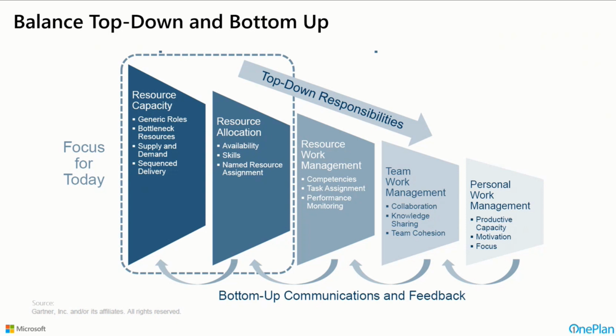Now, the bottom up might be, all right, now we've got detailed project schedules or work plans, and we're assigning people to specific tasks or work elements, and that information is all rolling up on a time phase basis to give us that resource plan that we have from a very granular perspective. Now, many organizations aren't ready to do that yet, but some organizations do a combination of those two things.